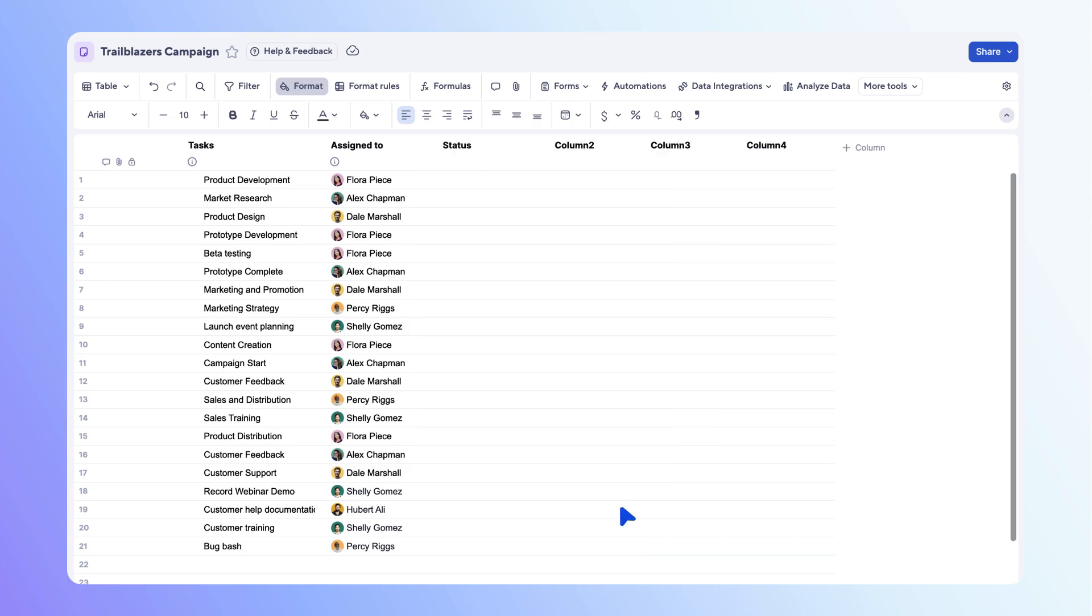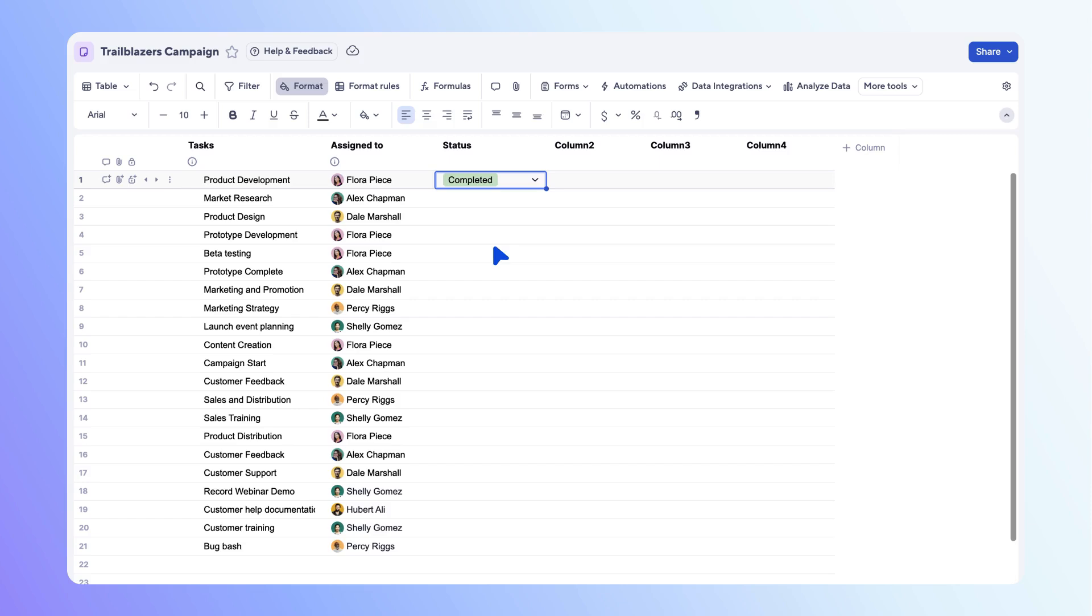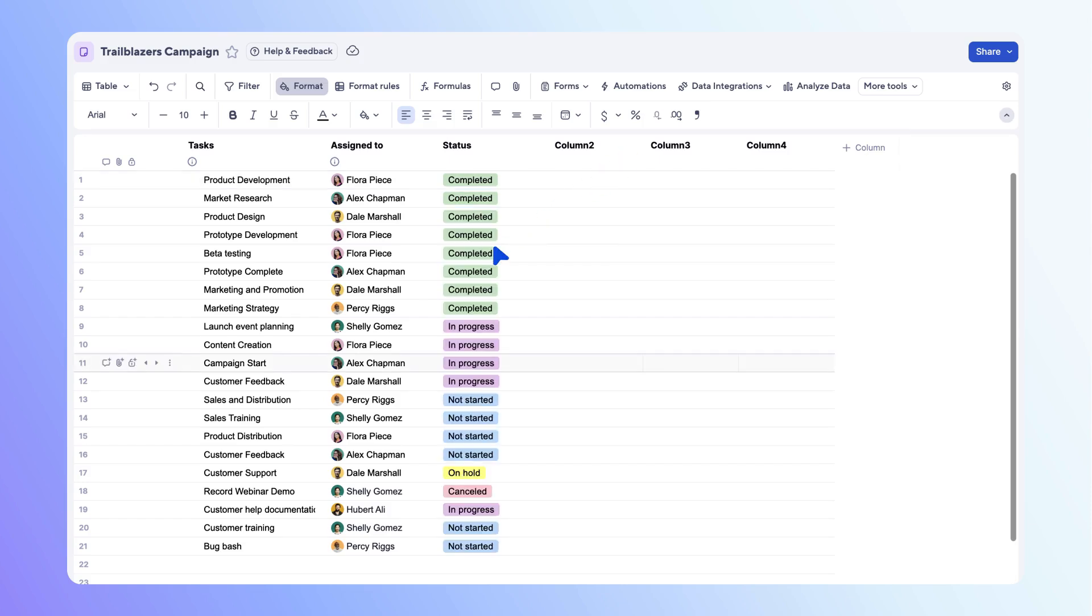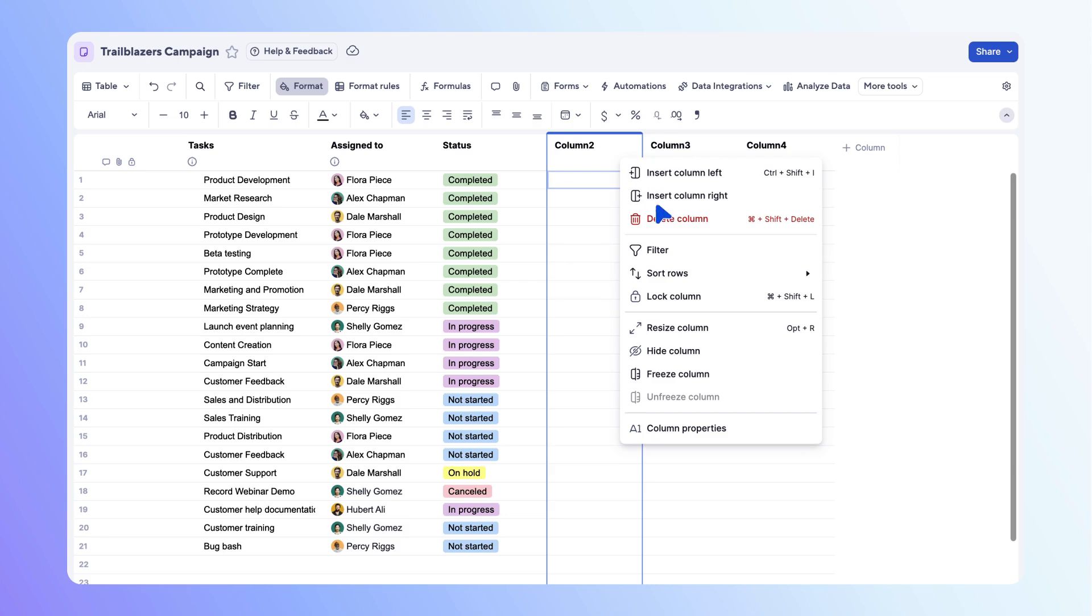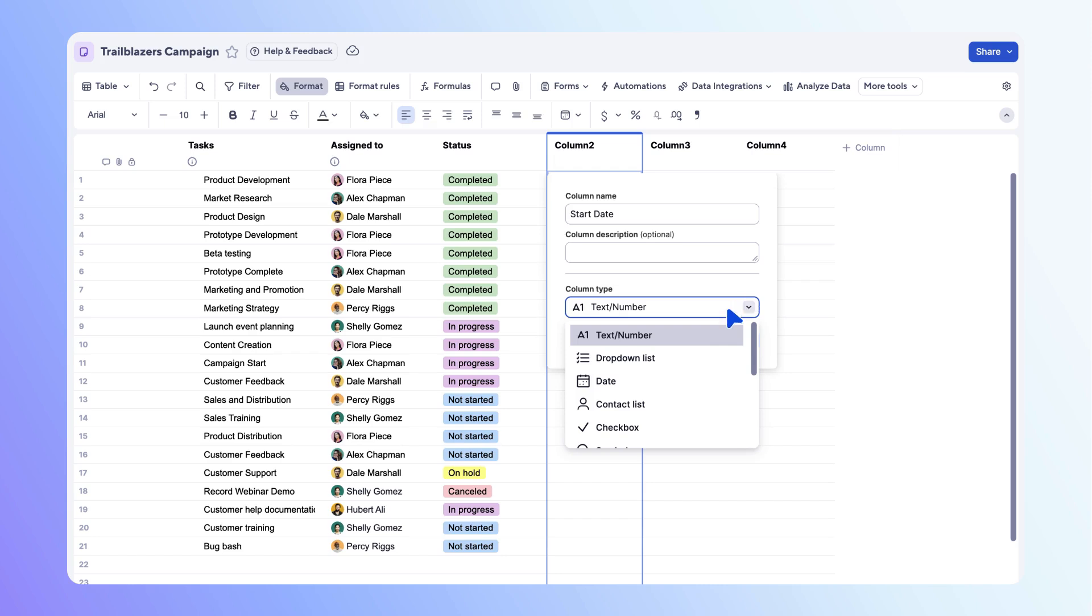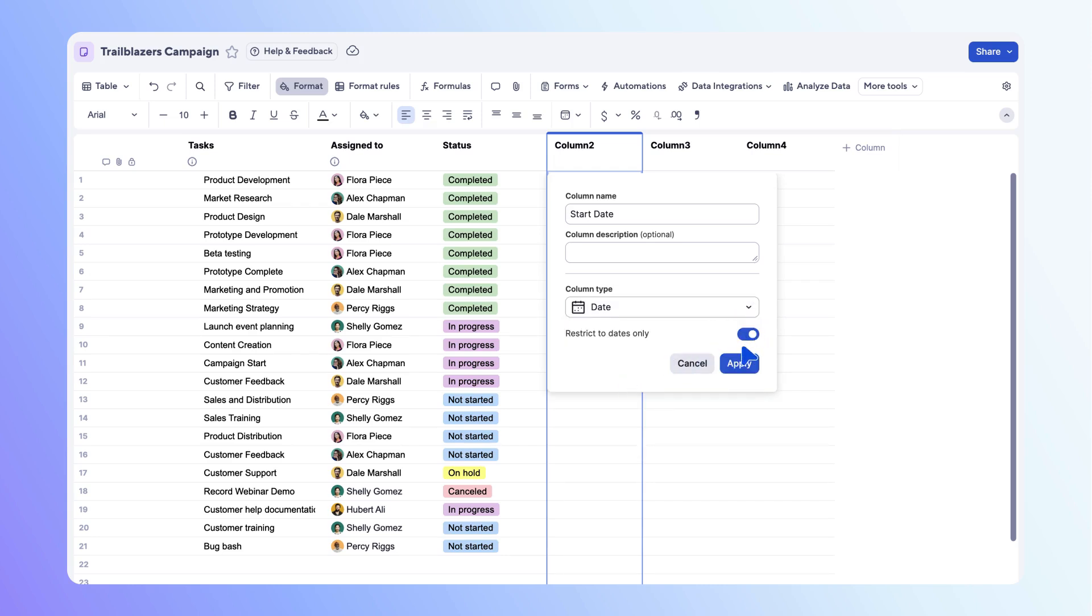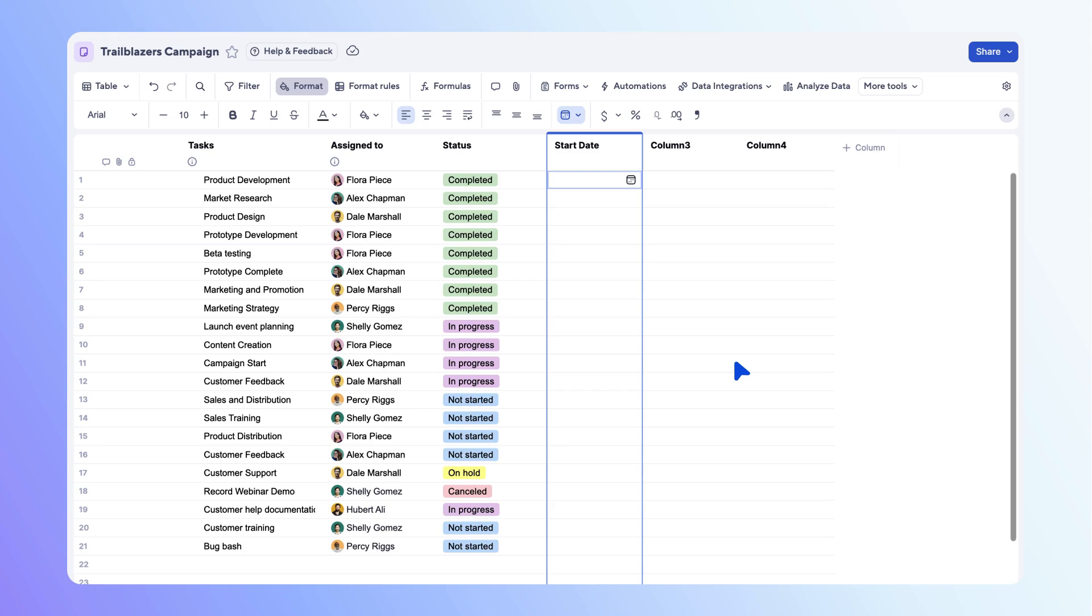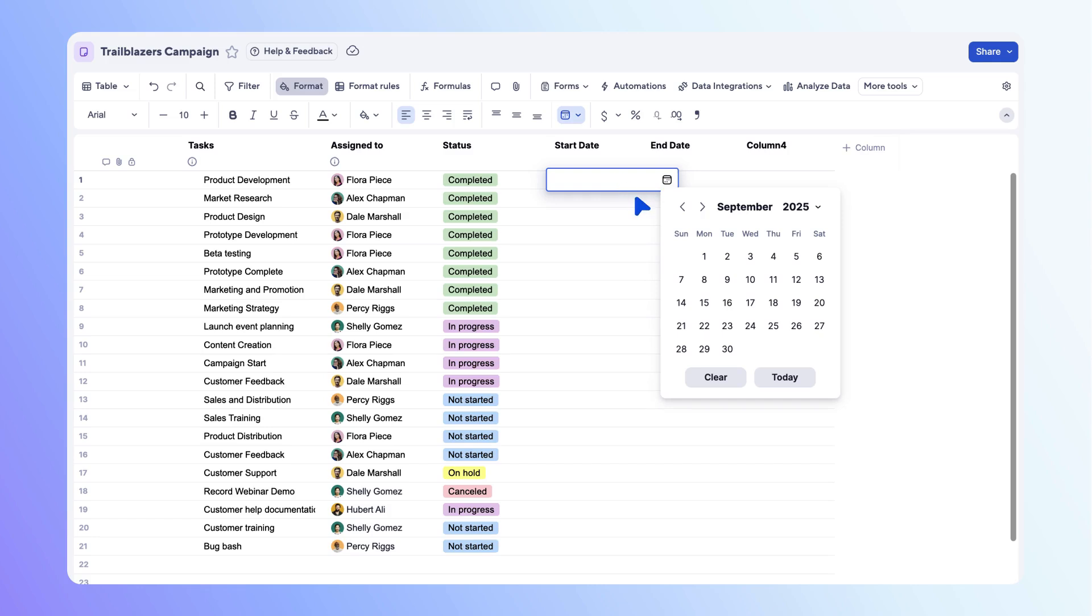Add a status for each of your tasks. Next, let's add a start date column and an end date column. Edit the existing columns using the column options menu. Use the dropdown menu to change the column type to date. Toggle on the setting to restrict the input to dates only, then select apply. Repeat those steps to set up an end date column, then add values to your date columns.